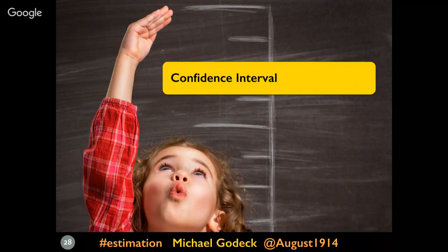Think about how you estimate risk. Since you can't know the exact value of something uncertain by definition, then the value you choose must be an assumption. When you make point estimates, that is some discrete value of the most likely outcome, you're forced to bundle your assumption about risk and uncertainty into that single value. This makes the part of the estimate that's most likely to change with new information, right, your uncertainty or risk, less accessible for reevaluation because you just have this one thing, 4 days, right? How much of that is effort, how much of that is risk when you come back to it?